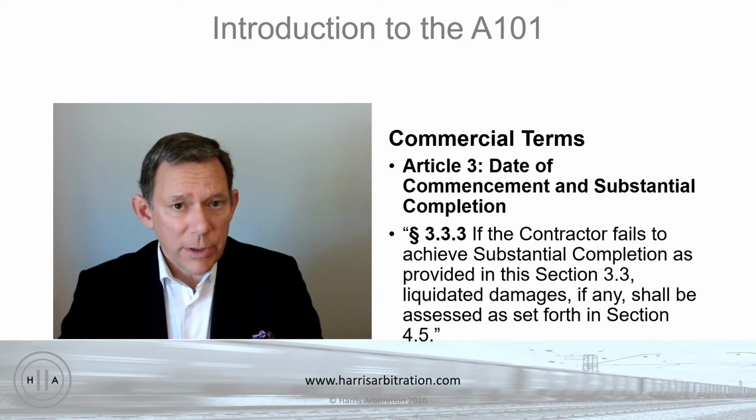But the lost revenue, if we're talking about building an apartment complex and the owner's planning to have tenants in beginning November 1st and the project doesn't get completed until December 1st, well, the owner's got a month of lost rental revenue that has to be compensated for.